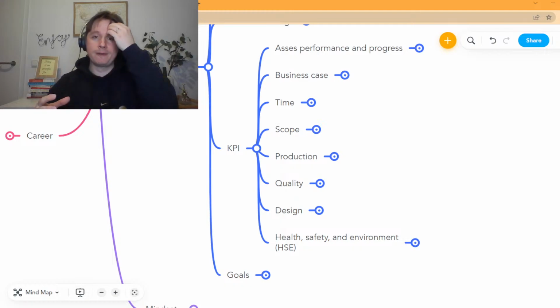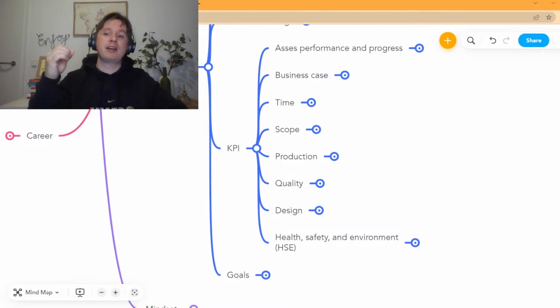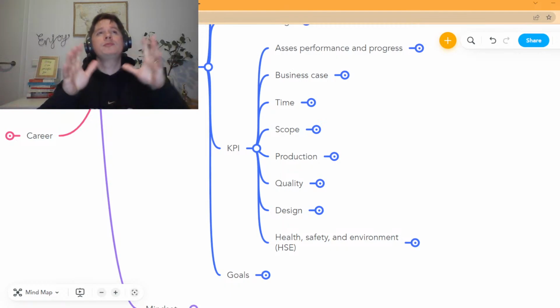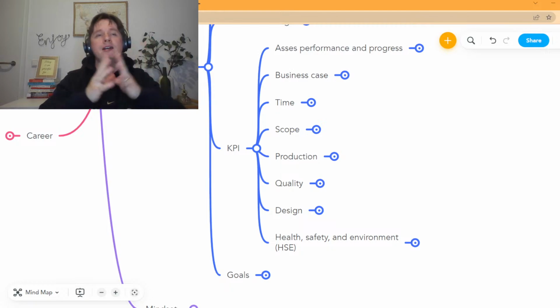That's what's important here. But something that I can tell you for sure, that's very important that you measure. All projects must have at least two KPIs. One KPI for business case. In business case, the bare minimum is the cost, and one KPI for time, regardless of what type of project you are doing. Because I hear people say, I'm using Scrum, then I do not have a KPI for cost. Well, of course you should have a KPI for cost.